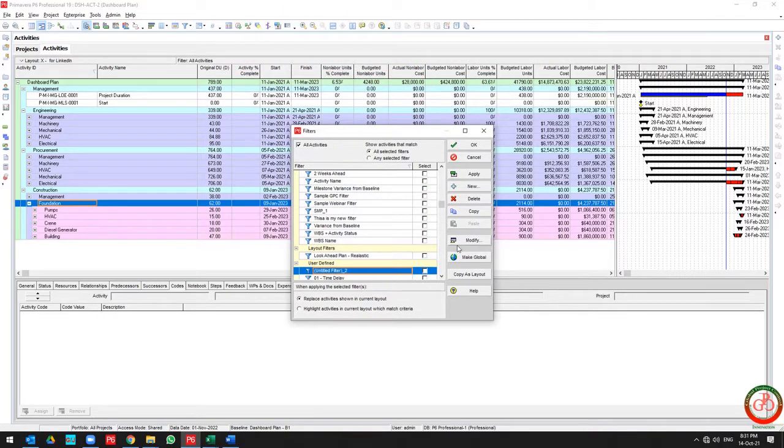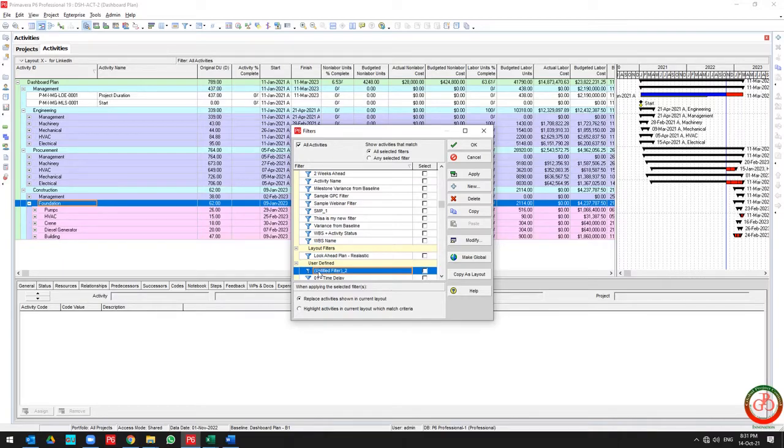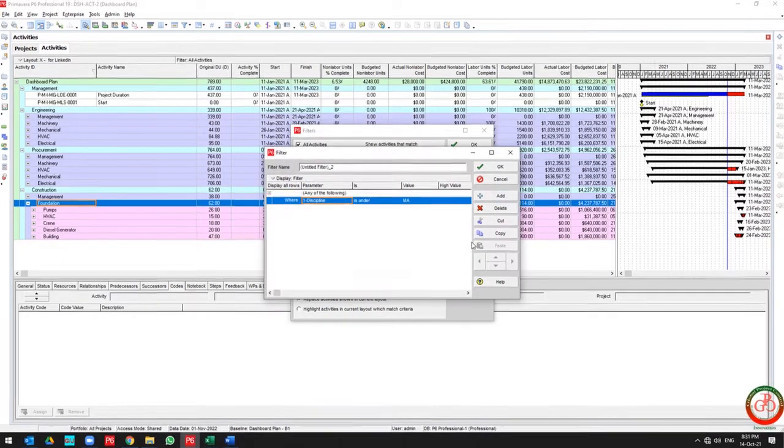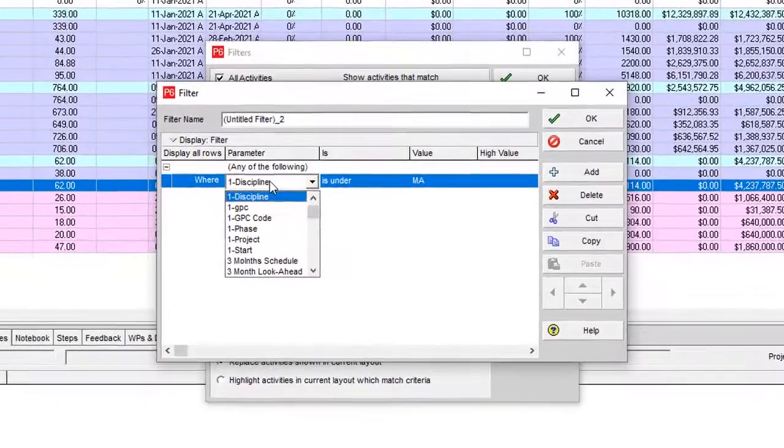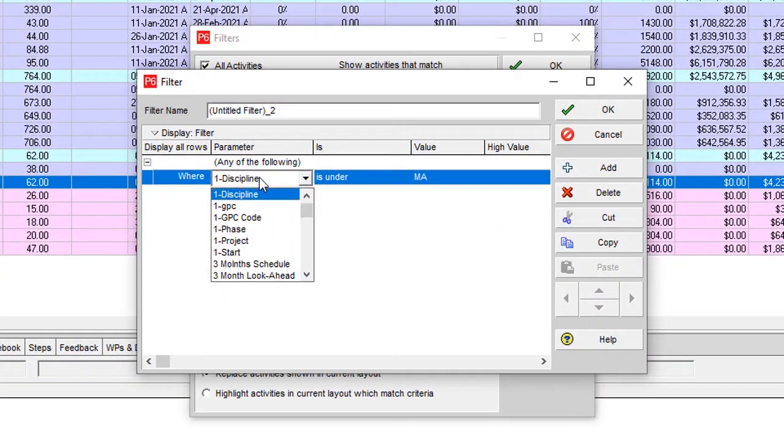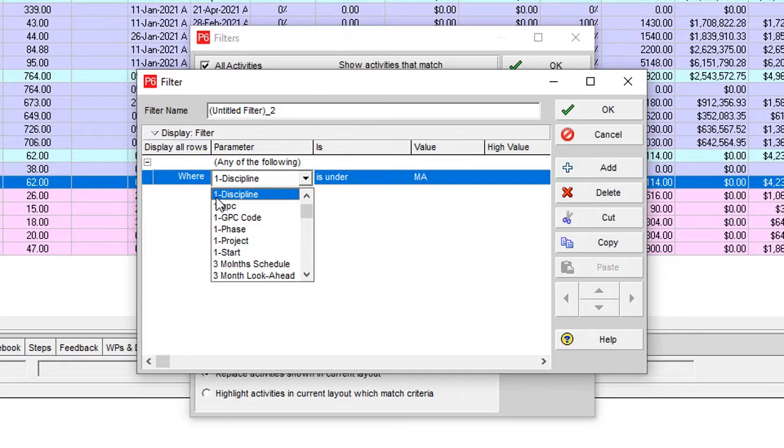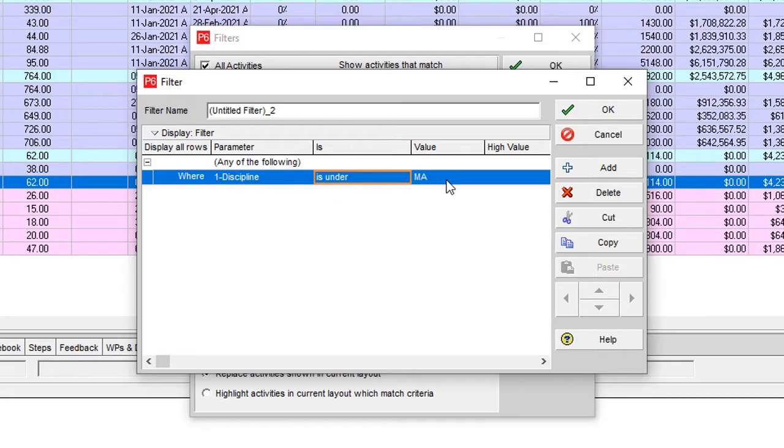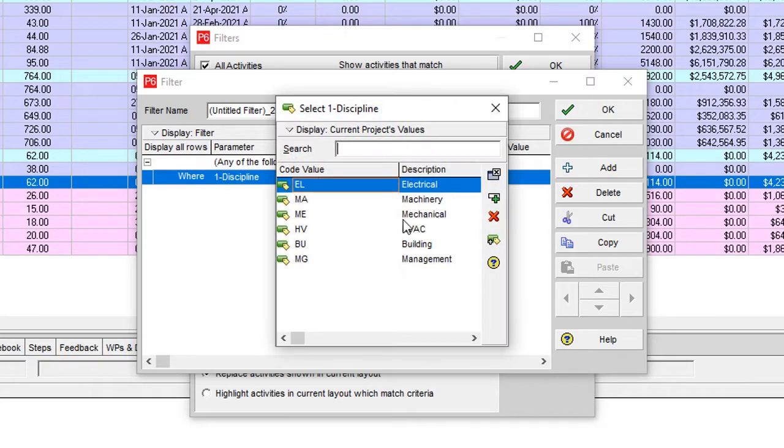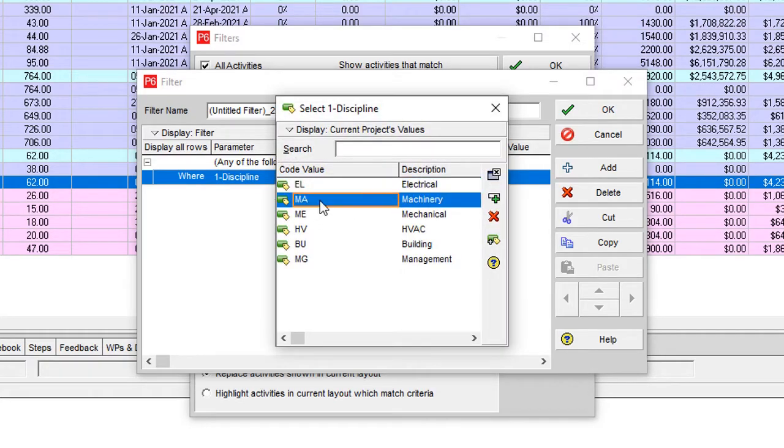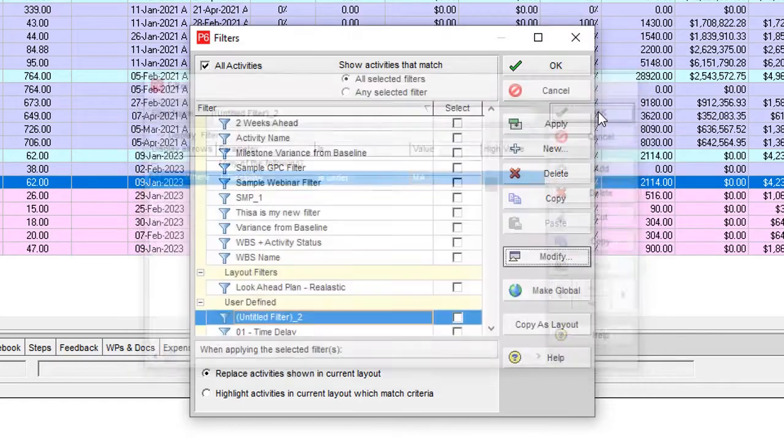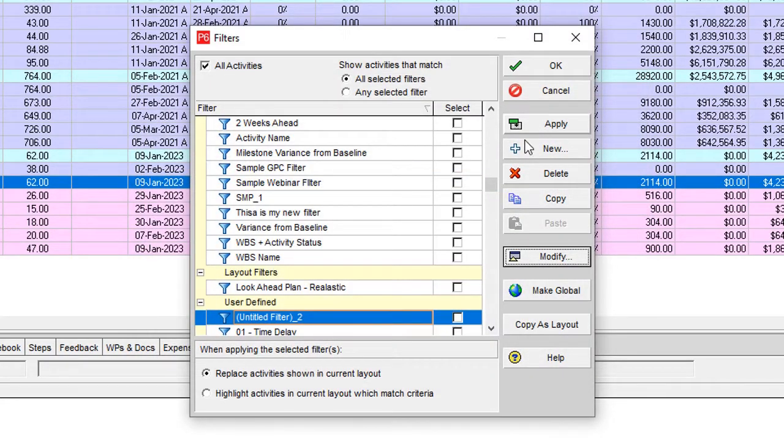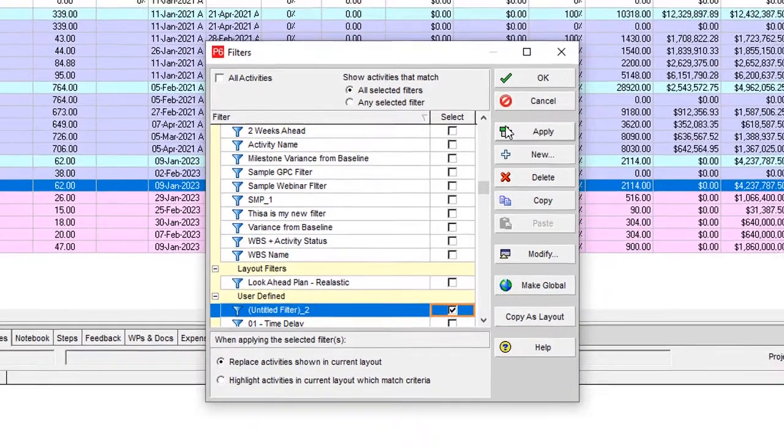How can you use the filter? First go to the filter, then press modify, then select your activity code. For easy search, I add a '1' before my activity code. I want to filter by discipline, so I select machinery discipline, then press OK.